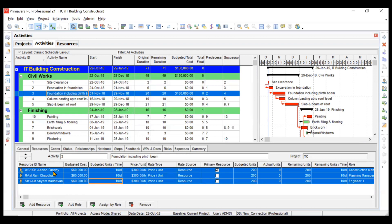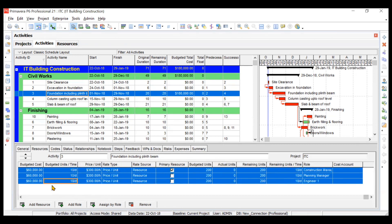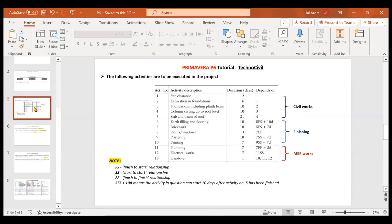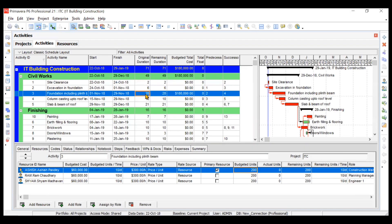Just by adding these three people, the total budgeted cost has increased to $180,000. To understand how this cost is calculated — for this particular person Ashish Pandey, he is taking 10 hours per day, his charges are $300 per hour, and his budgeted units are 200. The original duration is 10 days, which got changed by mistake — so we will make it 10.